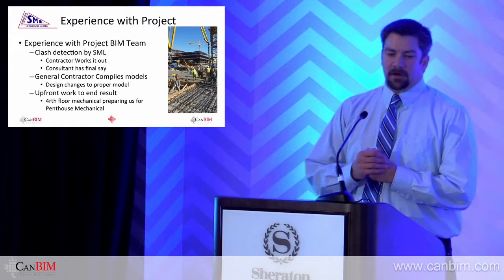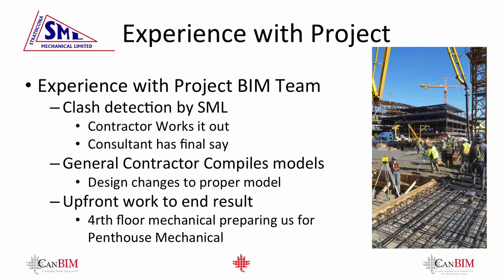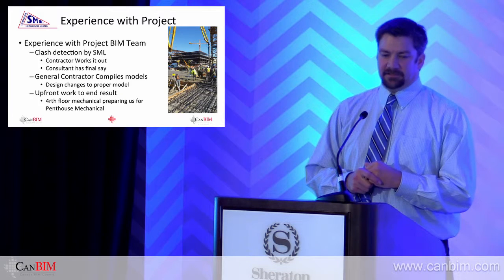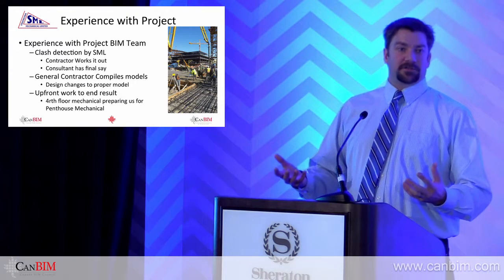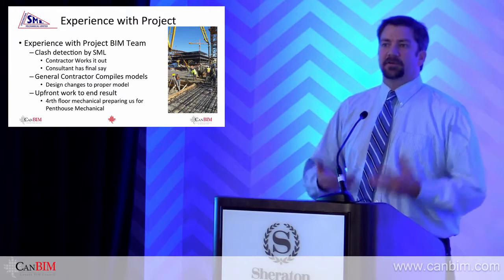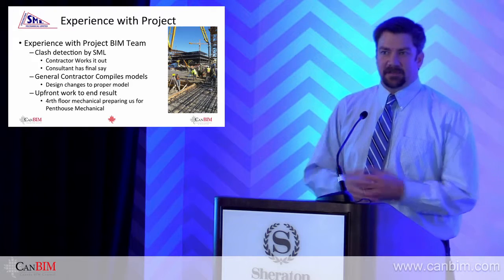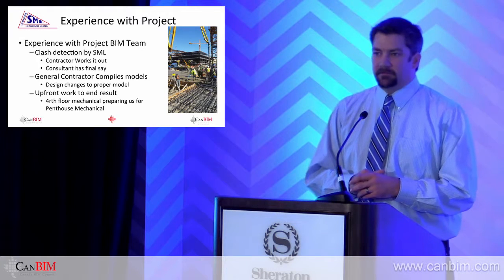The BIM team. Our experience with the BIM team in general, at the beginning there was a little bit of confusion. Who was responsible for what portion, who's going to pay for changes. Right now, the clash detections on the project are done by each contractor, who is responsible for their own. We have our consultant that deals with it. If we're in the way of another contractor, this is the benefit of having other contractors on a project that are actually willing to use the model. We work together, we work it out. In case it doesn't work out, the consultant does have the final say, but 95% of the time, we work with the other contractors and we figure it out together.